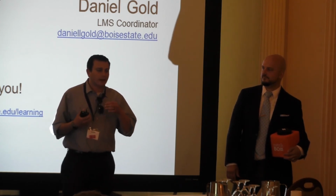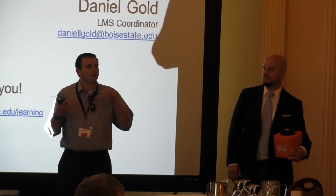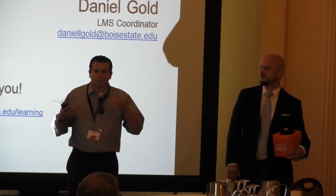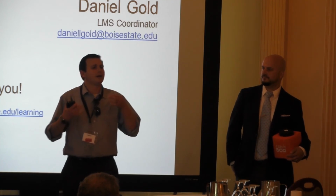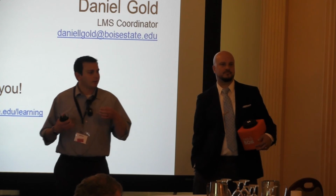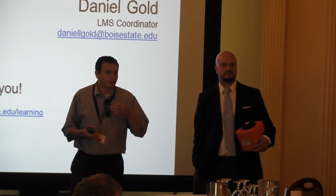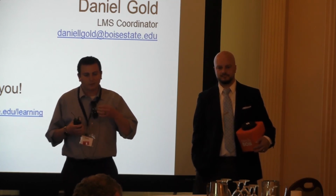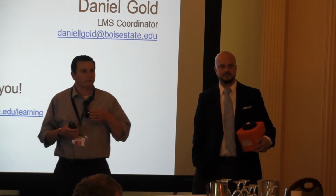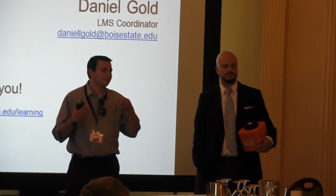One of the first things I like to ask comes from agile project management: what does done look like? For each of your areas and the people that you represent at this project team meeting, what does done look like for this project? How will we know when we are finished? A lot of times that gets to, from a support perspective, that I know what we need to do, it doesn't increase my call volumes, and I have all the access to the answers I need to give. From an academic side, it doesn't add any additional time for me. So you get to the root of each area's interests, and that can be really successful in helping create those teams and bring them together.